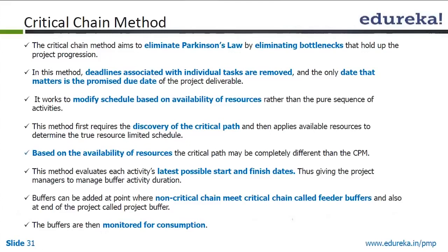And the method evaluates each activity's latest possible start and finish date, thus giving project managers the ability to manage buffer activity duration. So buffers can be added at the point where a non-critical chain meets the critical chain, called feeder buffers, and also at the end of the project, called the project buffer. Buffers are then monitored for consumption.